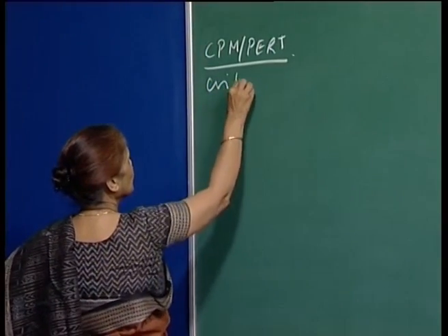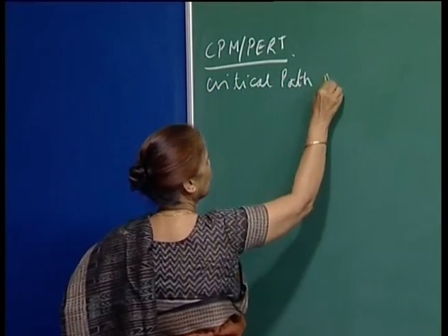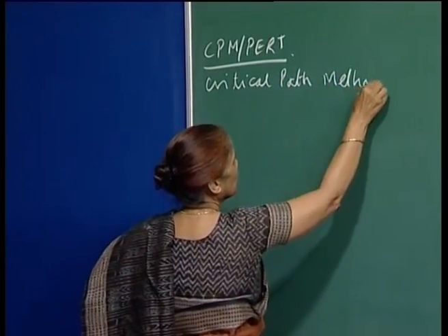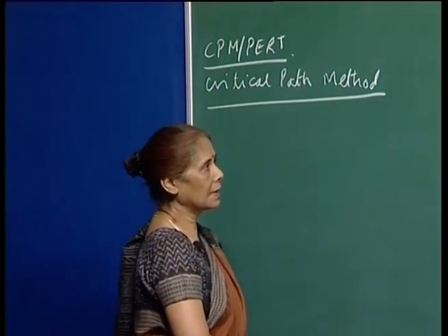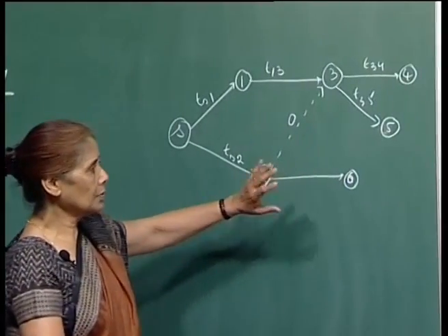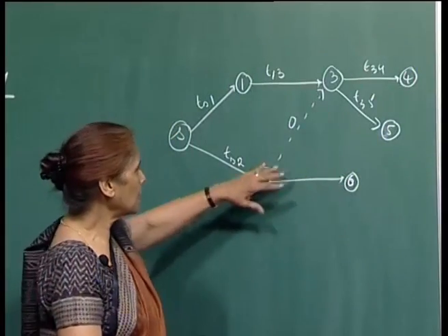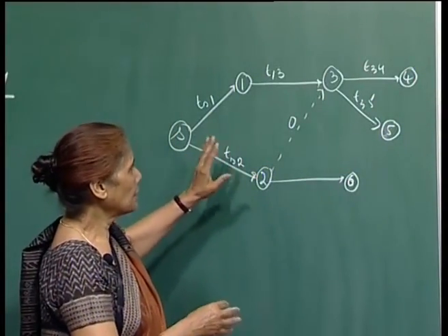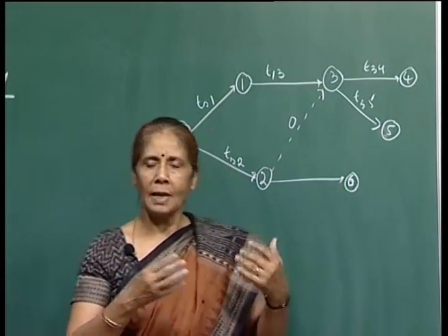So, this is the critical path method. A large project gets divided into activities which we think are in a way independent. That means different sets of people or different resources can be given to these small tasks or jobs, which can be done simultaneously.